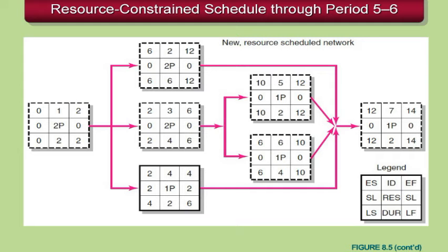After applying the heuristics and the resource limitations to the project network, you can see the impact it has on the project network itself. We went ahead and put in the early start time, late start time, early finish time, and late finish time from the Gantt chart. And what you'll notice here is multiple critical paths pop up. Instead of having our single critical path from the initial project, the project now takes 2 days longer and the project network is more sensitive.